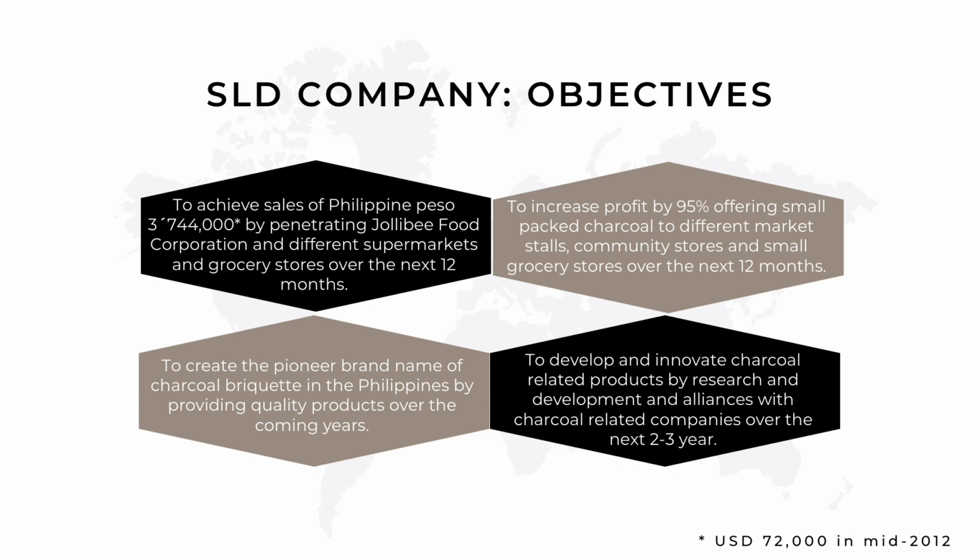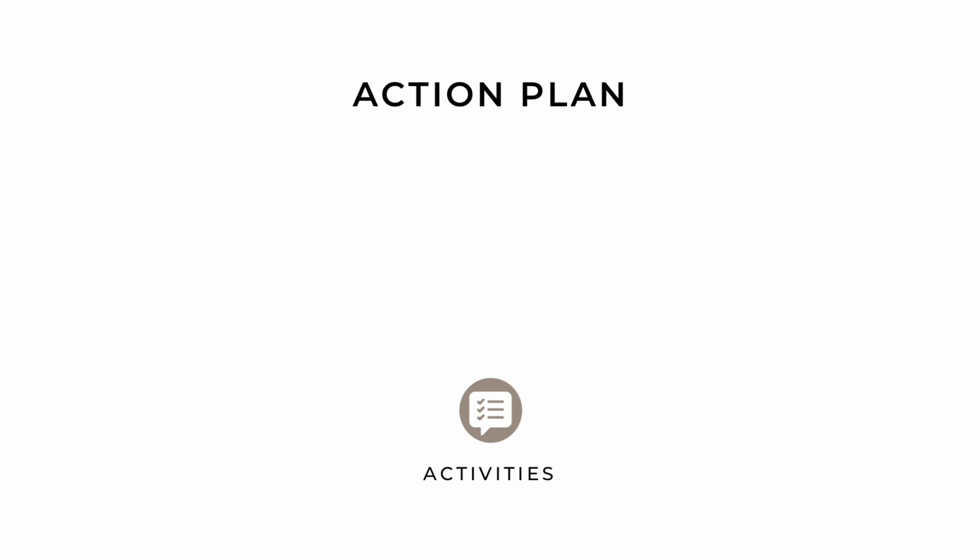Now that you have seen the examples, it is your turn to set objectives for launching a triple R business. You may use the table provided in the worksheet below to determine your SMART objectives. Once you have determined objectives for launching a triple R business, you need to develop an action plan. An action plan maps out specific tasks, sets intermediary milestones, and assigns tasks to specific staff members.